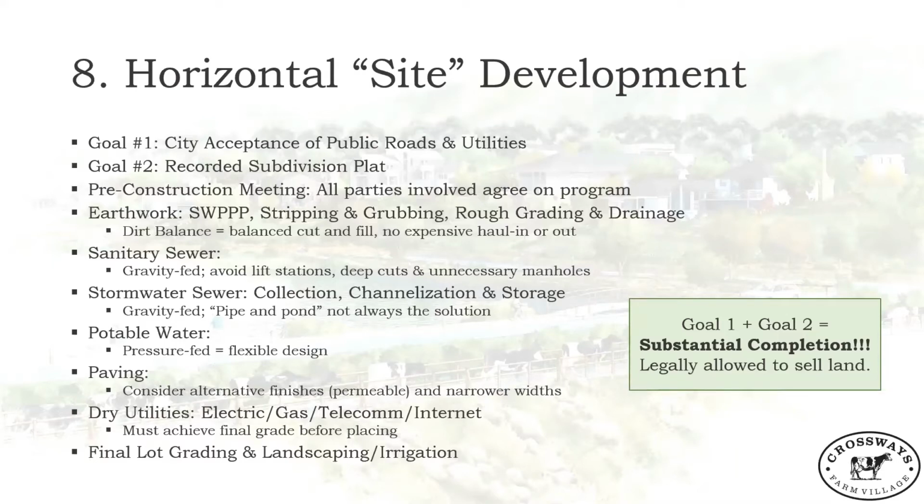So setting the stage again for stage 8, in the perfect world, your due diligence period just ended as you obtain that approved plat and that general site work permit, right? So the due diligence period expires, and within, say, 3 to 5 days, you are obligated to take out that loan and purchase the land from the Putter Guilds. In reality, you guys, I've been talking for 30 minutes now, actually longer than that. So you know how much we've done up to this point. The chances of you getting all that done during your due diligence period is very slim. Hopefully you've given yourself extensions and everything else you can to help that out. So in reality, you're probably already late. You purchased the land a month or 2 ago, and you've been incurring interest on that development loan. Ouch.